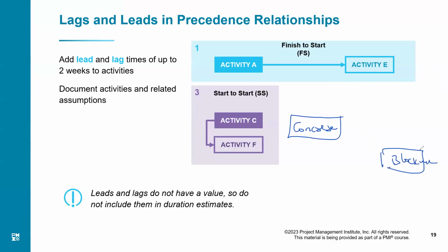Those who are in construction project, what is the logical relationship between concreting and block work? Is it finish to start, or start to start, or finish to finish, or start to finish? Usually the relationship between concreting and block work will be finish to start, right?